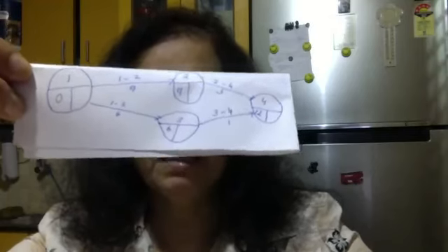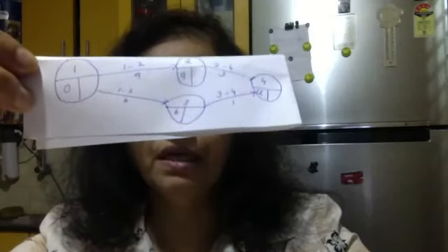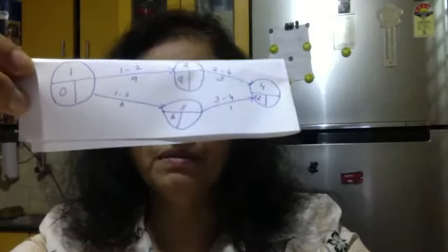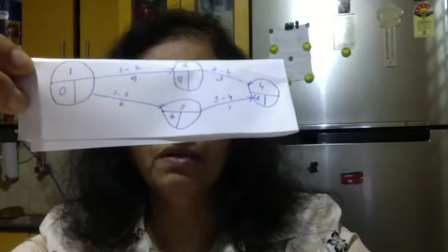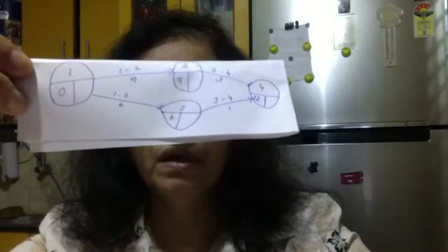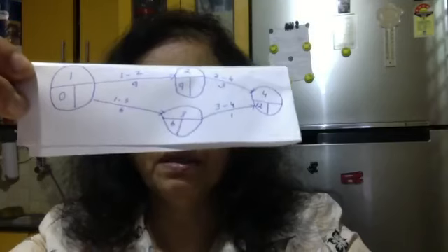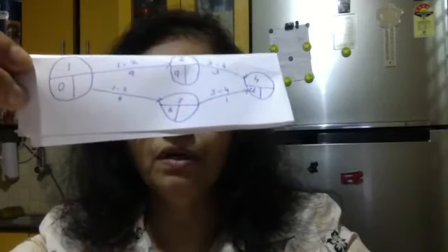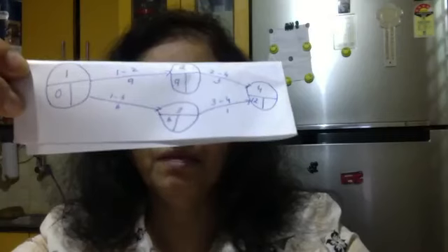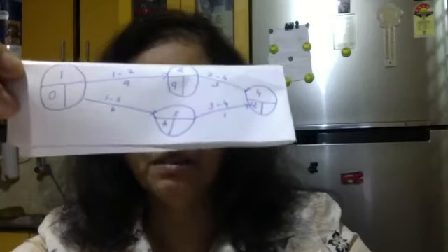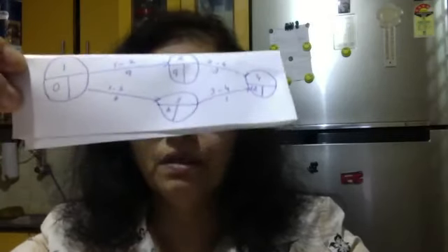Now class, we will come back. When you come back, you always have to take the lower number. Alright? When you come back, you have to take the lower number. Now, first, in the event 4, imagine this is the whole diagram. Imagine the problem is over.